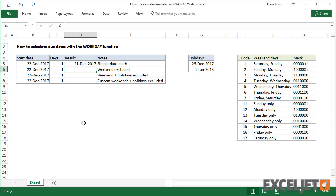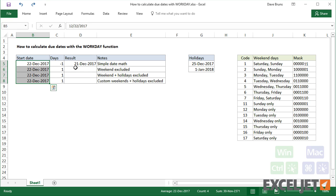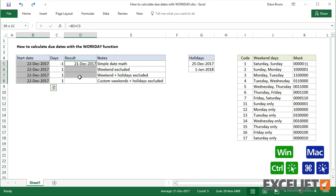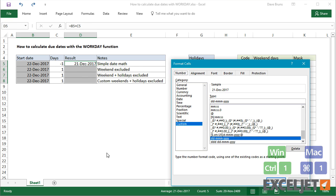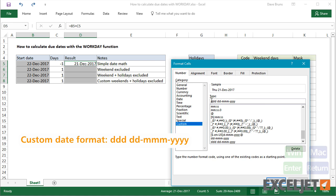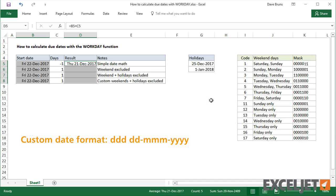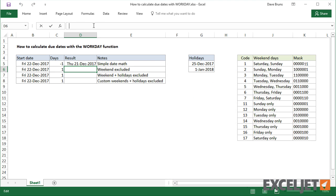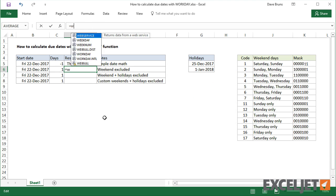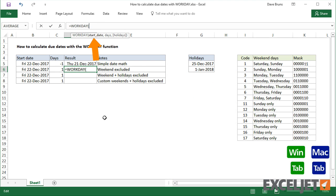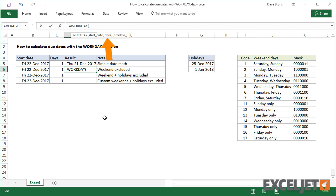Let me first apply a custom number format to these dates so we can easily see the day of week. The Workday function takes three arguments: a start date, days, and an optional range for holidays.